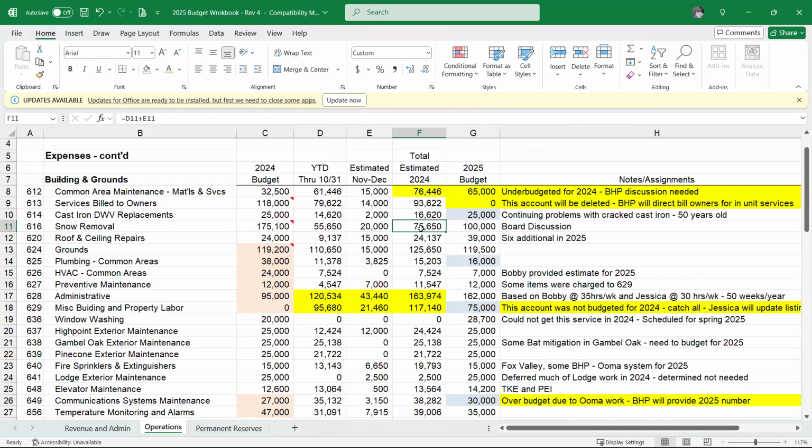And this goes back to us not having any money in reserves to play with. So without having money in reserves to play with, budgeting higher has got to be the option until reserves are back up. And I'll just add one more dimension to that: we don't have a contingency either. Absent a contingency and absent the reserves, we're setting ourselves up for failure. The worst case is going over budget on this stuff.